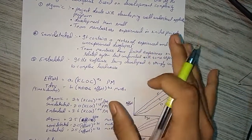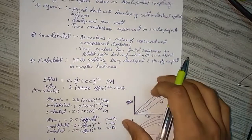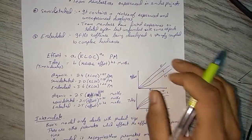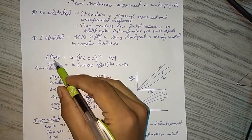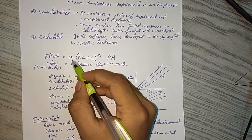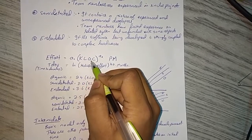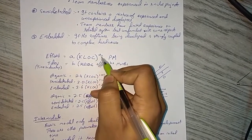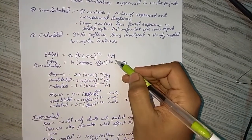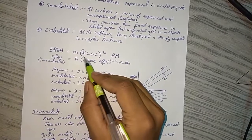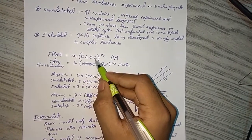So we have an equation for finding the effort. Effort equals a1 times KLOC (kilo lines of code) raised to a2, PM. a1 and a2 are constants and KLOC is the lines of code in thousands.